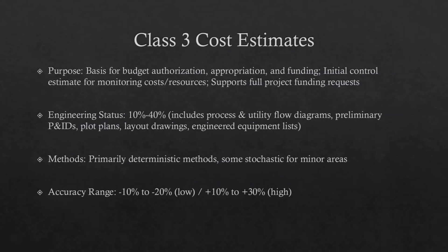Class 3 estimates are generally prepared to form the basis for budget authorization, appropriation, and/or funding. As such, they typically form the initial control estimate against which all actual costs and resources will be monitored. Typically, engineering is from 10% to 40% complete and would comprise at a minimum: process flow diagrams, utility flow diagrams, preliminary piping and instrument diagrams, plot plan, developed layout drawings, and an essentially complete engineered process and utility equipment list. Class 3 estimates are typically prepared to support full project funding requests and become the first project phase control estimate against which all actual costs and resources will be monitored for variations to the budget.